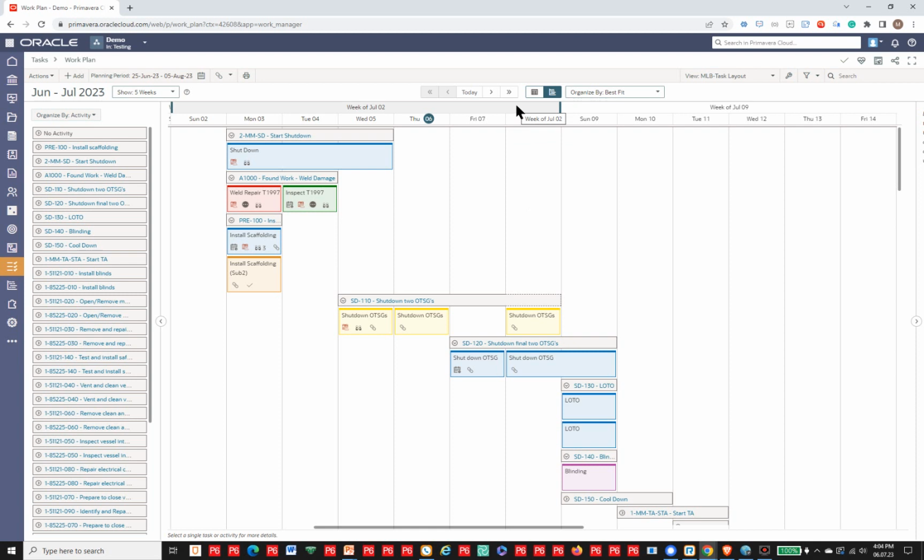Now, what we have here is another level of breakdown. So what this allows you to do is split the activities into the tasks required to complete those activities. Now, in some cases, you don't really need to split it much at all, but you may want to track all your progress using tasks, in which case you'll give that particular activity a task anyways.